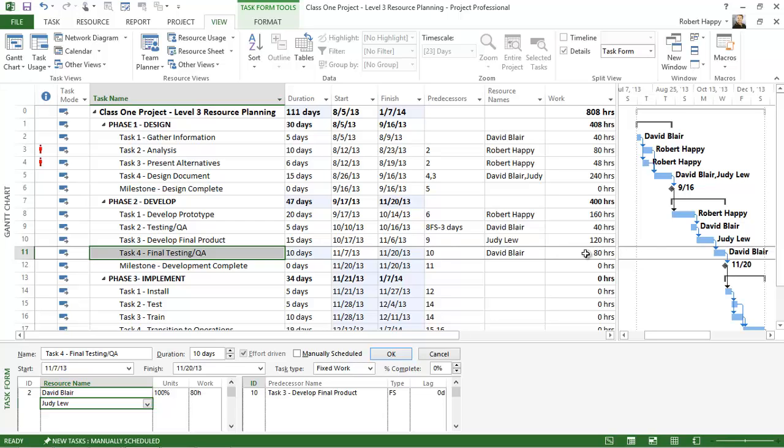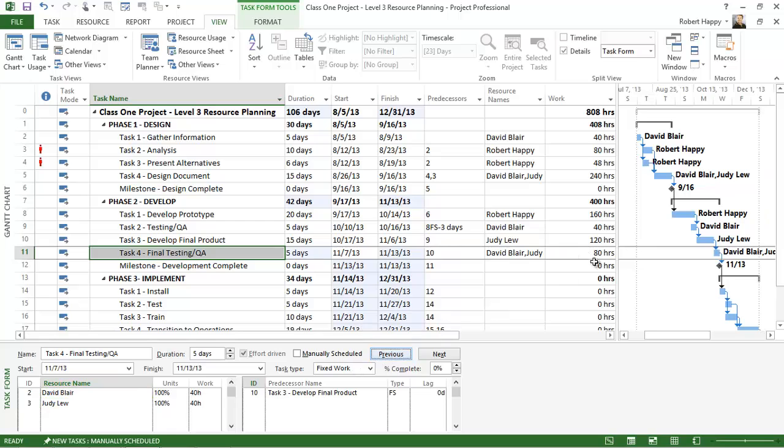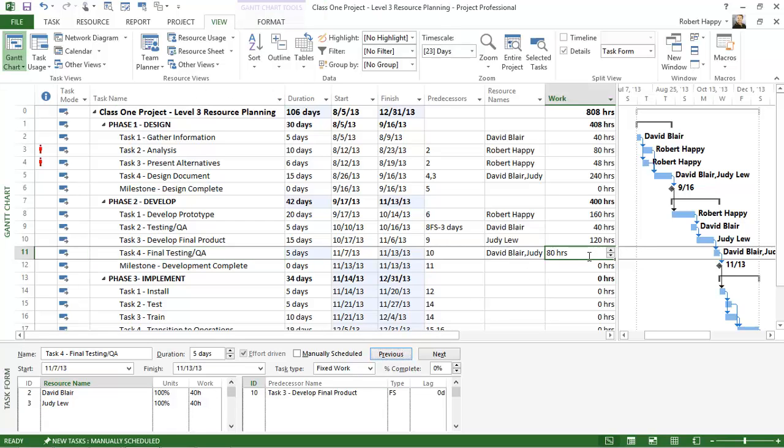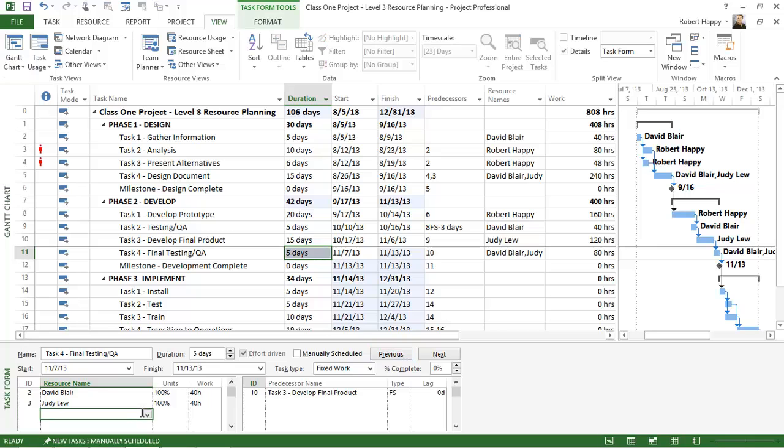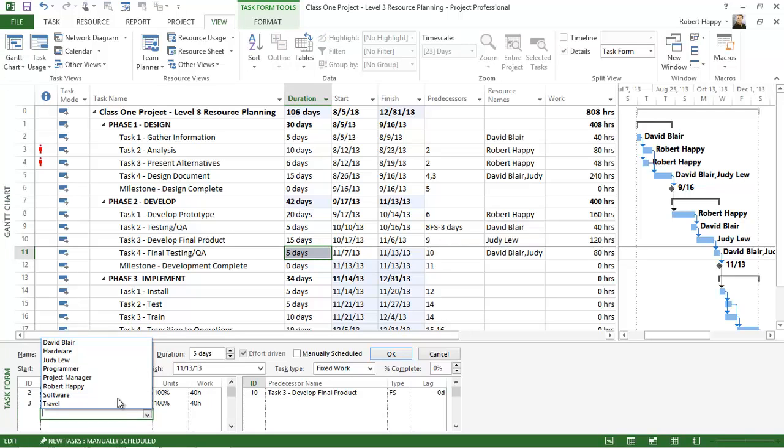That's like painting the room. The more painters you have, the less the duration is going to be, but the work will stay the same. So if I actually click OK, notice that the work gets split between us, 40 hours each. The total work stays at 80 hours and my duration is now five days, and that duration would continue to get smaller and smaller as I add additional resources.